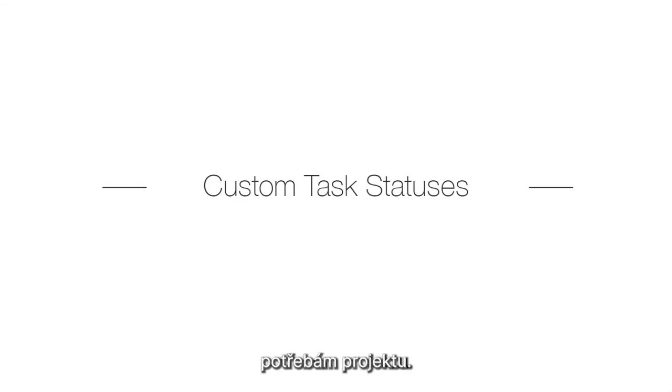Today I'm going to introduce you to the Custom Task Status module. Custom Task Statuses enable a customized workflow progression best suited for the needs of the project. Through Custom Task Statuses, you can enable a progress tracking flow that mirrors current processes through custom status names, colors, permissions, and the order of the statuses.